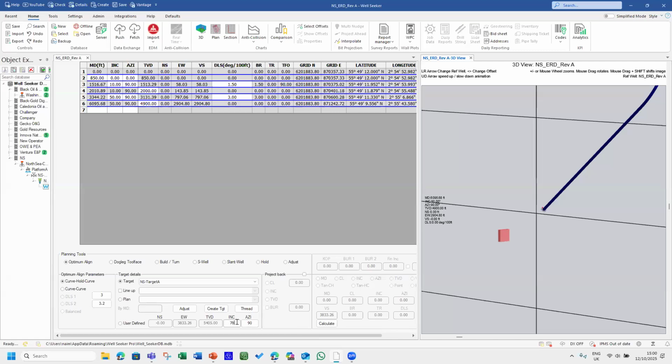It's just a number. You can say, I would like it to be different, and who will give you this information? Subsurface people, and also some of the learning curves. Some inclinations are bad for you according to the local drilling experience. So it's not coming out of the hat. People know exactly what it should be. So we need to talk to the coordinators and people. So let's just say, yes, what we have done is to select the target to hit and select the inclination to hit with and select the dog legs that we would like to use.